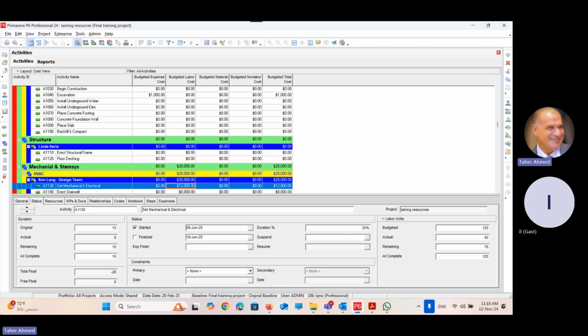So using Excel is a very good tool, because, as I told you, all you have to do is sit with the team member and give him a training of 10 or 15 minutes: what we mean by early start, early finish, actual start, actual finish. I will send you the column which represents the early dates, the planned start date according to the plan, and an empty column for the actual start date. When you start the activity on November 12, go there and put the date November 12.